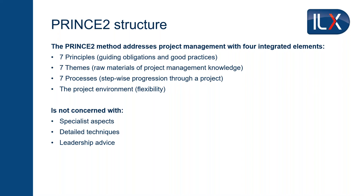Detailed techniques: PRINCE2 offers a couple of techniques but says there's no defined set. What you need to find is appropriate techniques. For planning, there is a suggested technique — defining and analysing products, four steps. But scheduling techniques, estimating techniques, are not part of PRINCE2; it suggests you go and find good standard ones. Similarly for risk identification and investment appraisal — PRINCE2 makes some suggestions but doesn't mandate any of them. What's appropriate in your organisation?